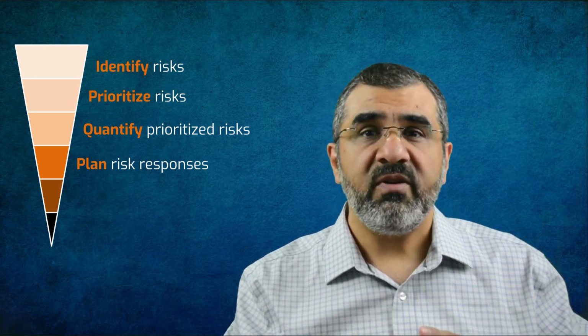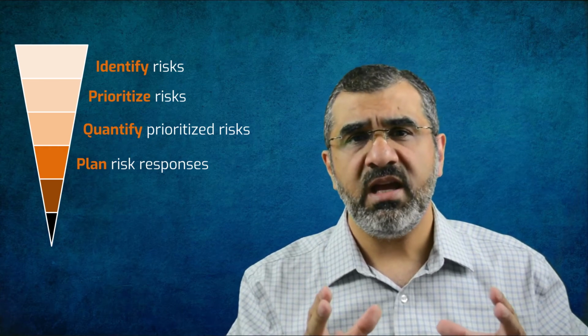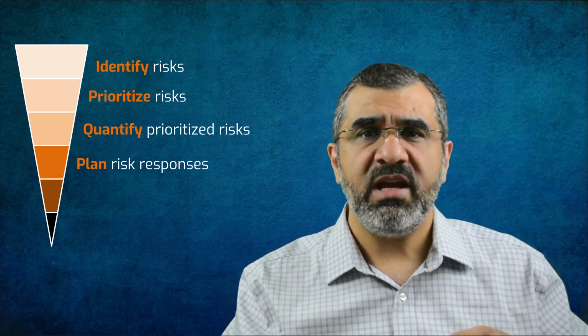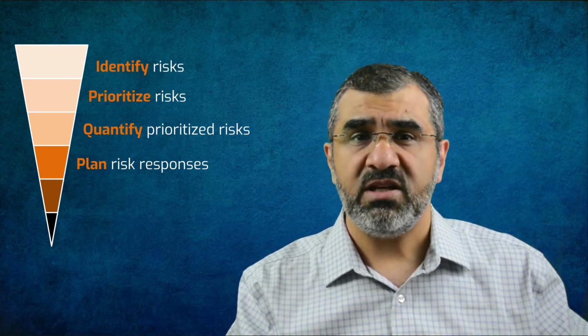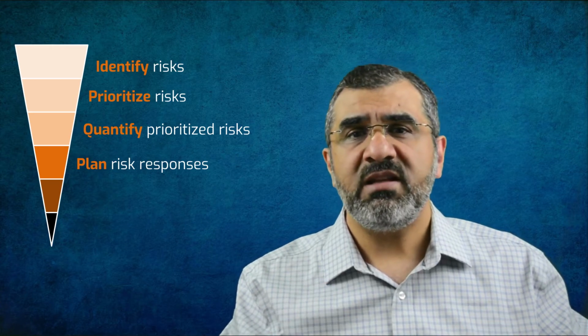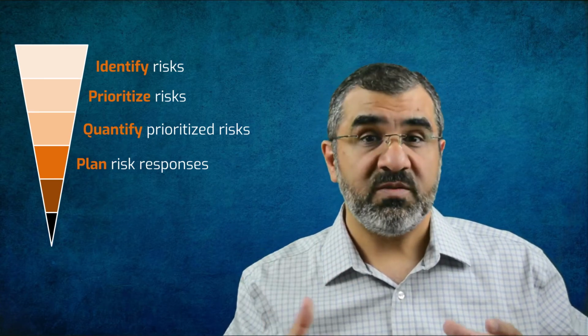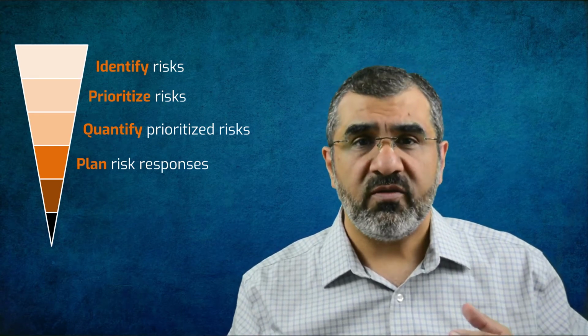Here, the team will first decide what will be the strategy to respond to a risk. Are they going to accept, mitigate, transfer, or avoid the negative risk, and adopt an appropriate strategy to manage the positive risk? Once the strategy is agreed to, then the team decides on a response plan or response actions and also identifies who will be the owner of the risk.